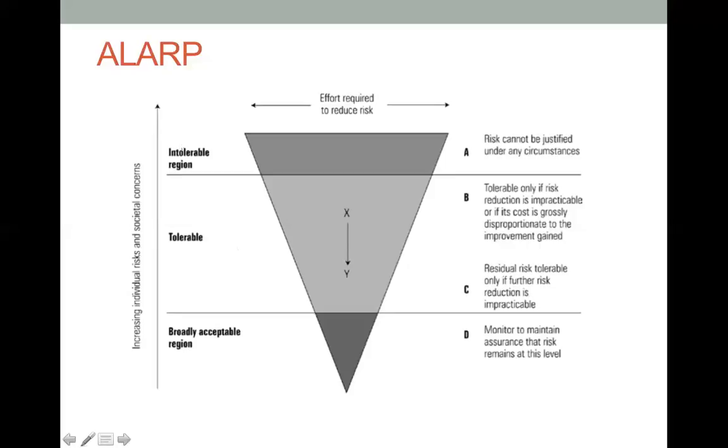So in practical terms, for our organization, we can also map the risk based on the level of tolerance that we can address. The first one being intolerable, the second and third groups would be tolerable, and the last group is the one that we can accept. Yes, we accept it, and we just need to monitor it. So these are the three categories that we need to understand from the perspective of managing risk priority.